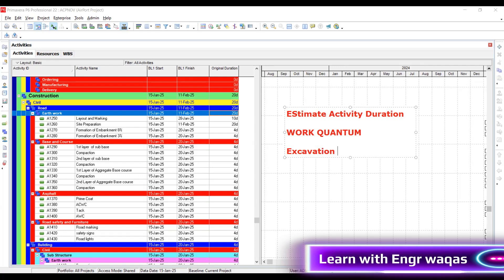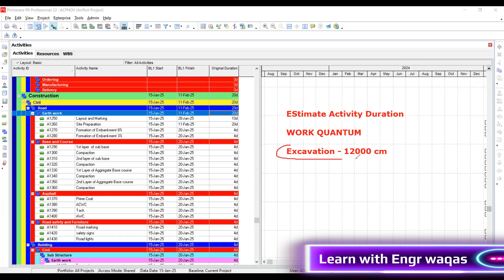There is an activity within BOQ. From the design document, it will be derived that you are going to make 12,000 cubic meter excavation. This is your total work. 12,000 cubic meter - this is your total work given in your BOQ.